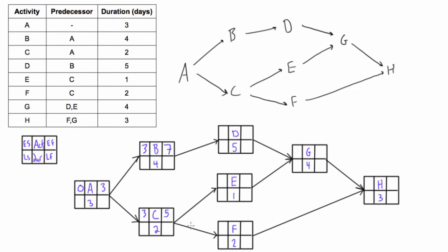We bring seven into D, and seven plus five is twelve. We can't fill in G yet because there are two arrows coming in and we pick the larger value. For E: we bring five up, five plus one is six. The twelve wins for G because G depends on both E and D — it can't start until both are done. E finishes at day six but D finishes at day twelve, so we wait until the end of day twelve. We bring twelve in, add four, and get sixteen.